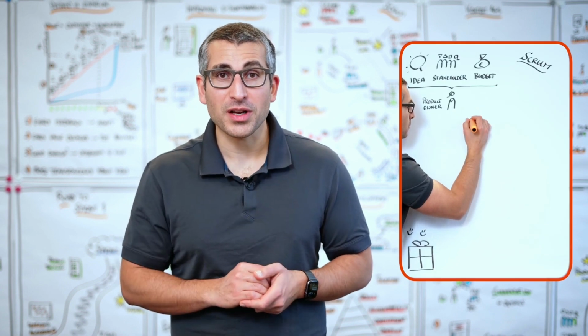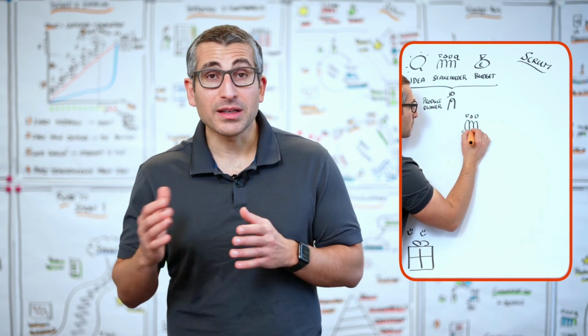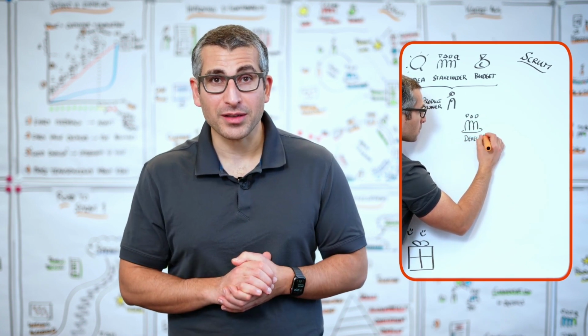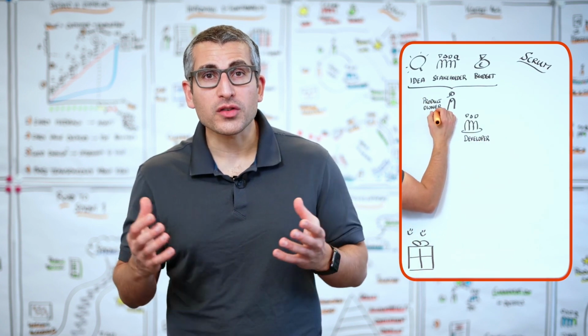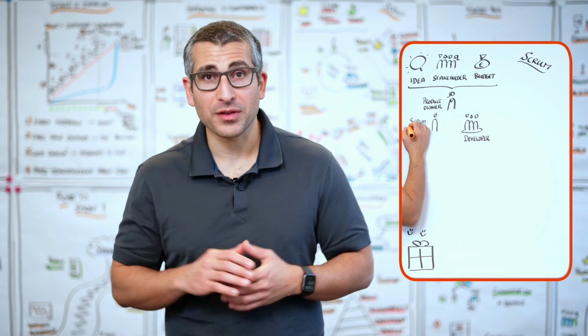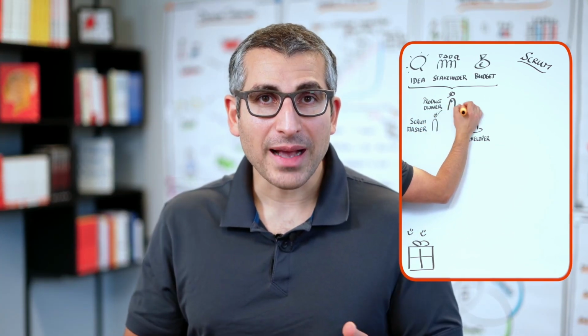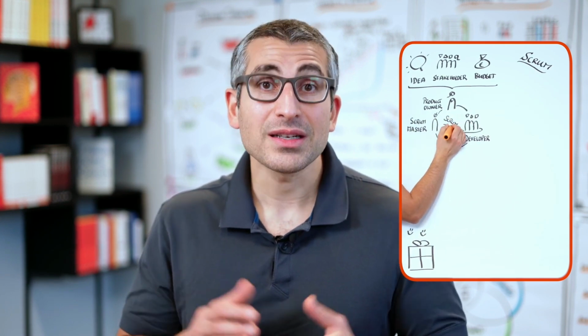That's where the developers come in. Product owners decide what we build. Developers decide how we build things, at least from a technical perspective. Now, one thing is missing: someone that works on how we collaborate as a group, how we become more effective as a team. That someone is our Scrum Master. Scrum Master, product owner, and developers together are referred to as Scrum Team.